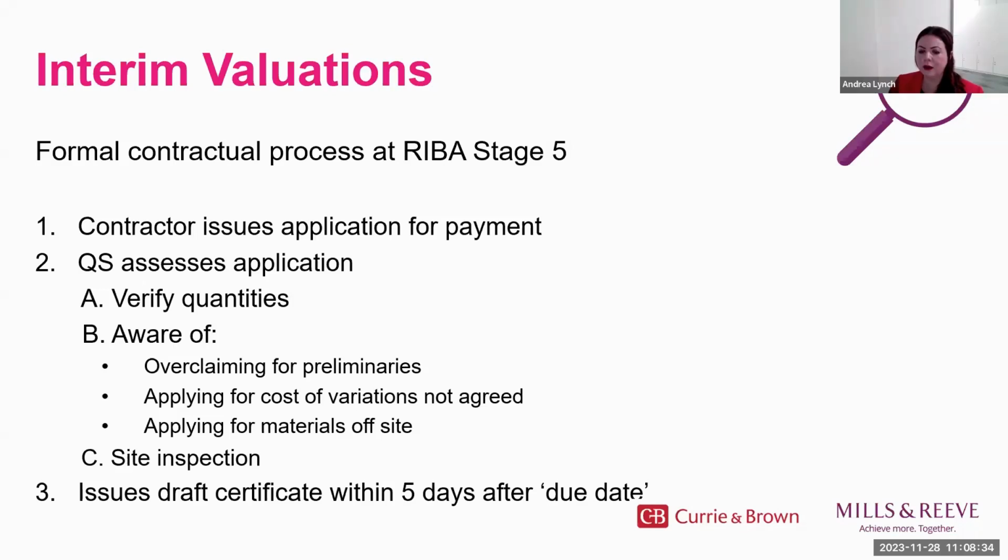And is there a standard procedure when assessing interim valuations, or is it normally just on a case-by-case analysis? It's a fairly standard procedure. At the start of any contract, we will agree a schedule of valuation dates with the contractor. There are often different valuation timescales depending on which contract is in place. Typically speaking, a contractor will issue us with their payment application before the due date in the contract. All stages of the payment or valuation cycle are determined by this due date. My role is to carry out a valuation and issue my certificate within the 5 days following that due date.